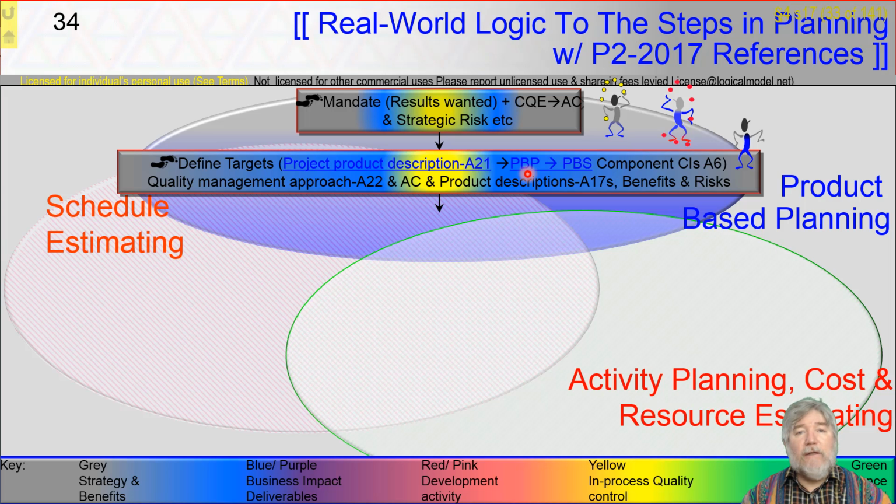And that in many circumstances is by mapping to well-known standards. So the DIN standards in Germany, or the ISO standards across Europe, or the British standards within the UK, although most British standards, after they're written, get adopted by ISO and get an ISO number, as do others. In Japan there's another set of standards. So very commonly we map the deliverable expression in what Prince calls a product description to a well-known standard.